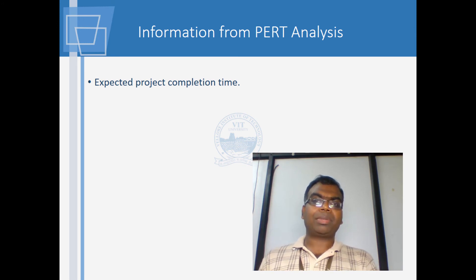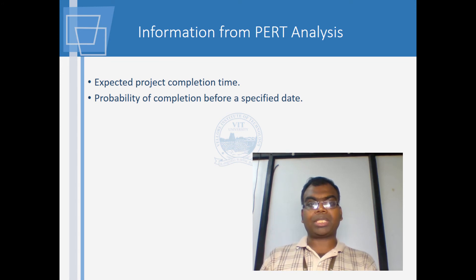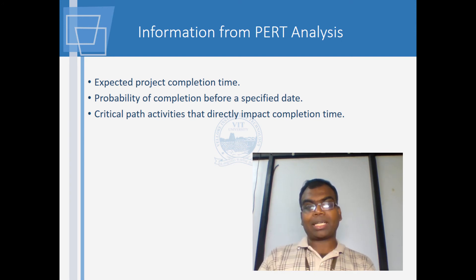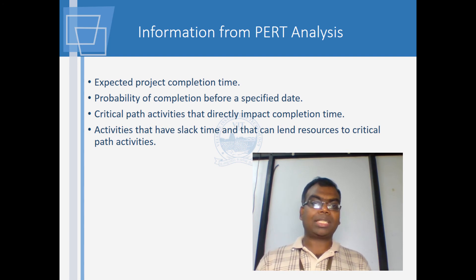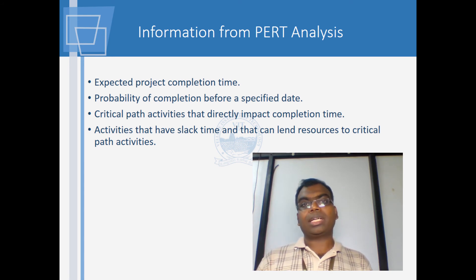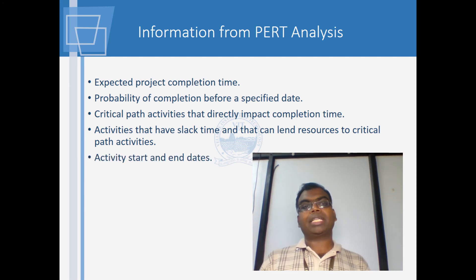From PERT analysis we get the following information: expected project completion time, probability of completion before a specified date, and which critical path activities directly impact completion time. Activities that have slack time can lend resources to reduce stress on the critical path. However, we should be careful that non-critical paths are not made critical because focus has been shifted away from them.